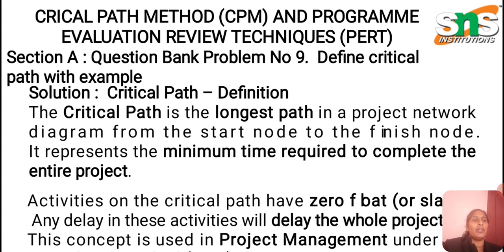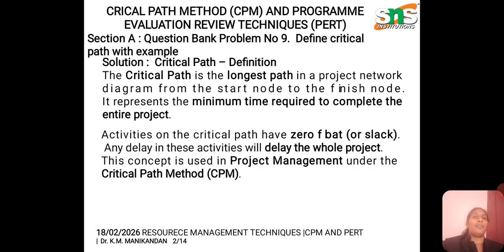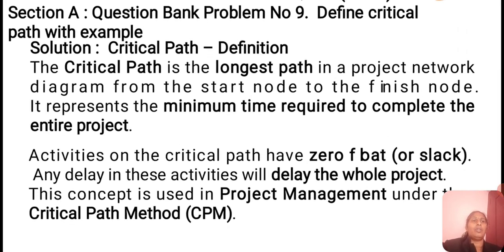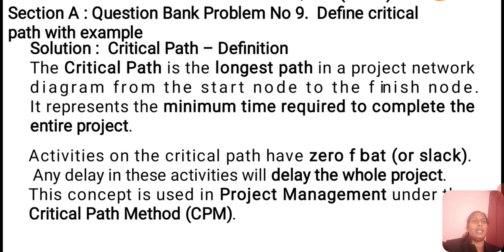We have some activities, and a delay in them delays the whole project. The concept is used in project management also. Already I have mentioned that the critical path is nothing but the longest duration, from the start node to the finish node. It represents the minimum time required to complete the entire project.